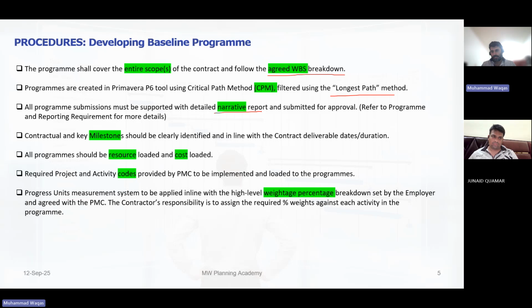Which should include a high level summary of the program itself, the manpower curve, the progress S curve, all the KPIs, for example, cable trays, block work, concrete, ducts, FCUs, AHUs. For any activities there in the schedule, there should be a KPI, the histogram and S curve. So that after 1 year, you can refer to that specific presentation.